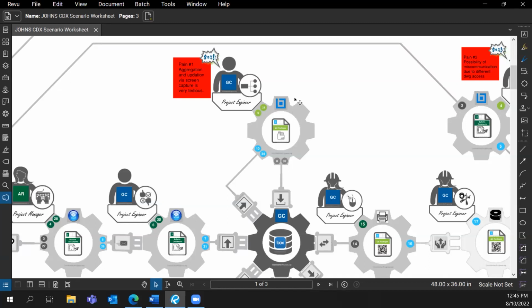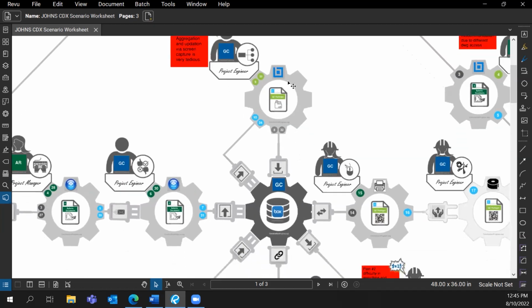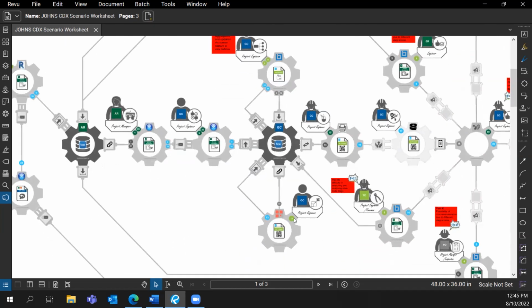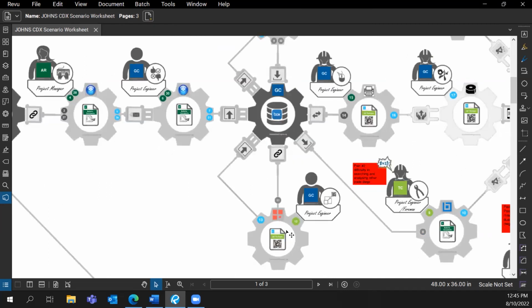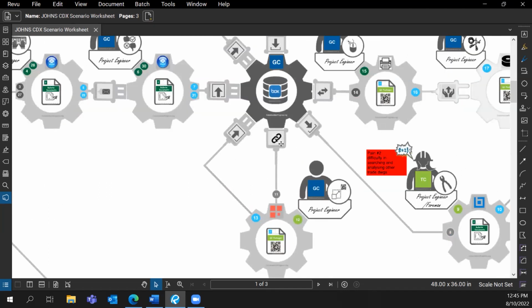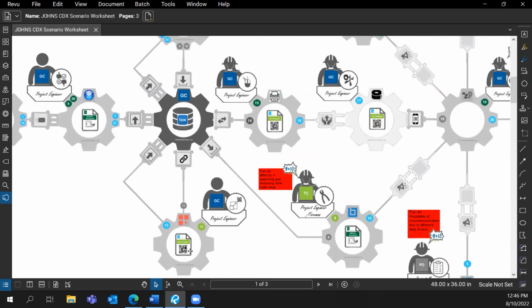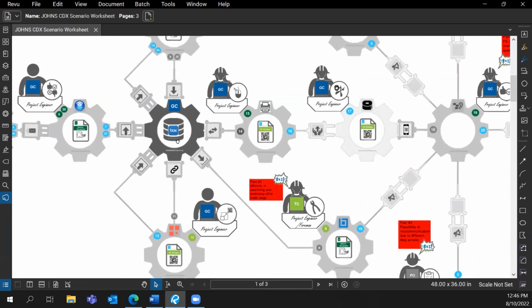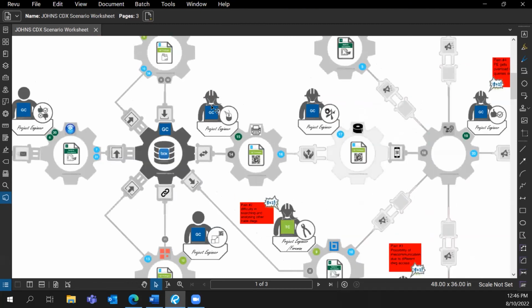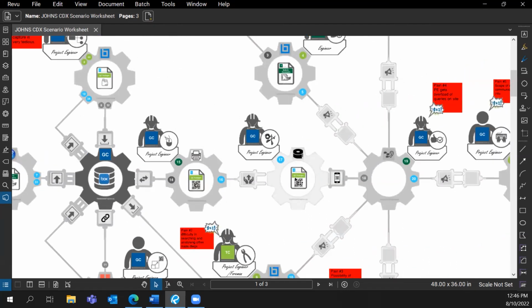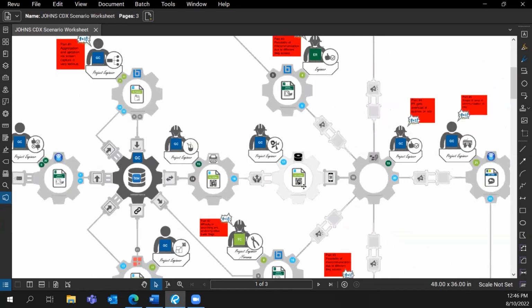Once that quality check package is created, we upload it onto the Box again. Next, the project engineer downloads the link for that package from the Box, and using a QR app that is easily available on the internet, converts this link into a QR code. These QR codes are then uploaded on the Box again. From there, the site project engineer downloads them, prints them out, and pastes these QR codes on the site.